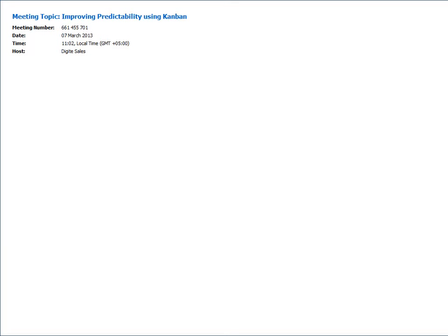So that is where the uniform distribution is more of use. What I showed was based on 3-point estimate, and a lot of the PERT guys would typically be using that kind of model. The algorithm also allows you to build a custom distribution model, though we have not built it in the UI at this point of time, but in the future you'll be able to do that also.